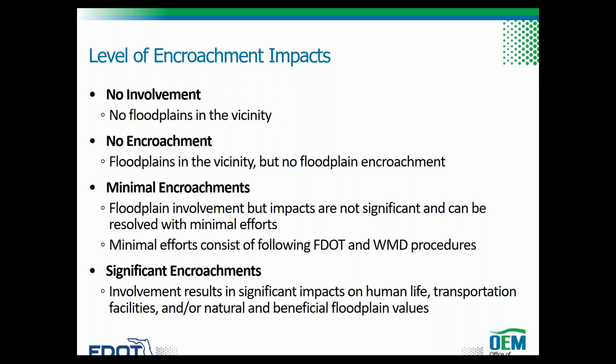The level of encroachment impacts can be no involvement, no encroachment, minimal, or significant. No involvement is when there is no floodplain in the vicinity of the project alternatives. No encroachment occurs when floodplains are in the vicinity of the project alternatives, but there is no floodplain encroachment.